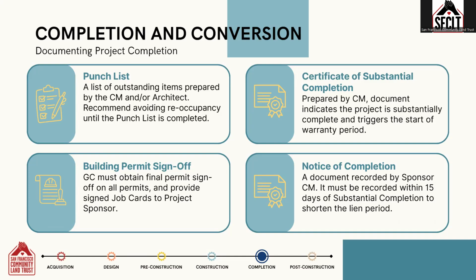Finally, the construction manager should prepare a notice of completion and have it recorded at the assessor recorder office. This document should be recorded within 15 days of substantial completion in order to reduce the lien period for the project.